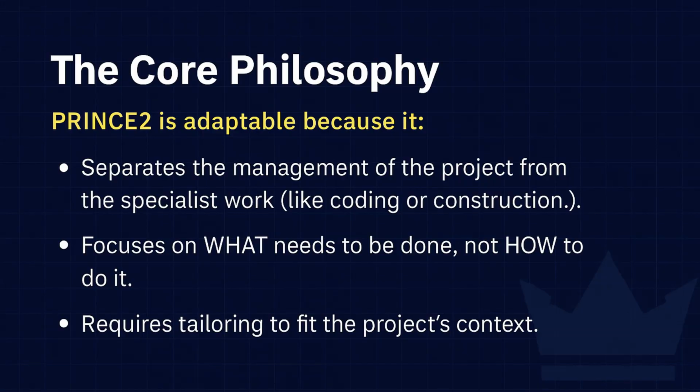And this is crucial for governance, isn't it? For managing upwards. Hugely. It means the project board, the senior managers, aren't constantly bothered with every tiny little issue or a minor delay. Right. They only hear about the big stuff. Exactly. This underpins one of the key PRINCE2 principles we'll get to later, called manage by exception. But the rule is, if the project is forecast to go outside its agreed tolerance for any of the key performance aspects, the project manager must escalate it. They don't have the authority to proceed outside tolerance. Okay, that makes sense. It triggers a formal decision.